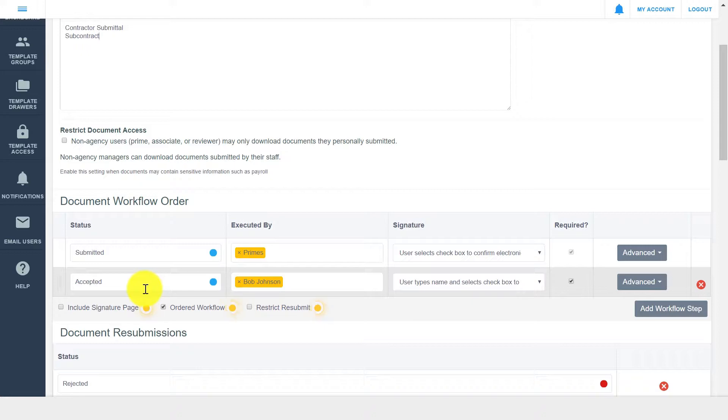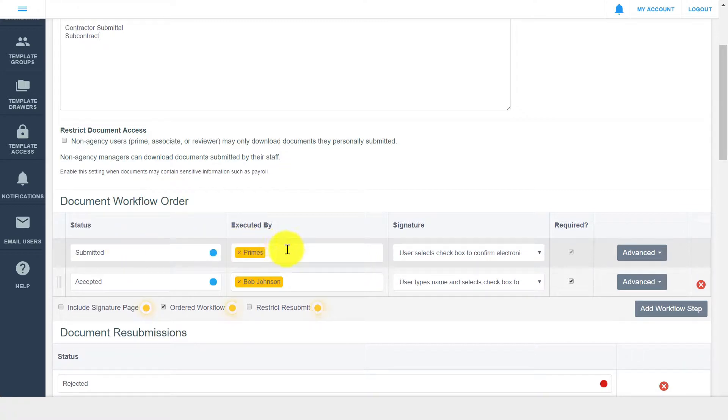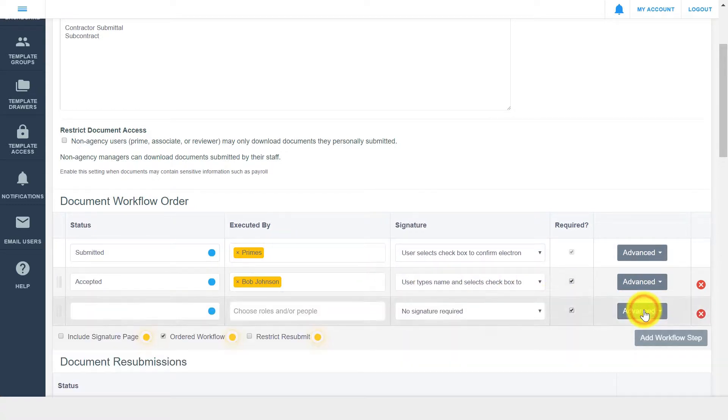Let's say we're setting up a submittals drawer that starts with contractor submission, and progresses through two additional review and approval steps. The first step would be submitted, done by the prime contractor, and the subsequent steps, which you can add by clicking add workflow step, would be under review and accepted.